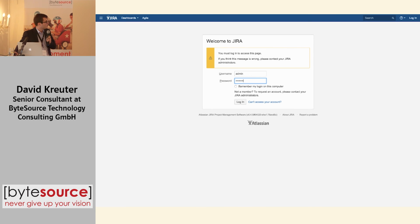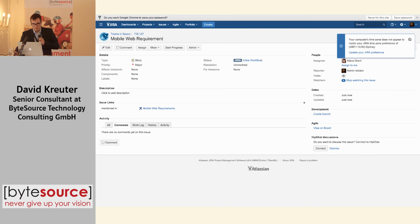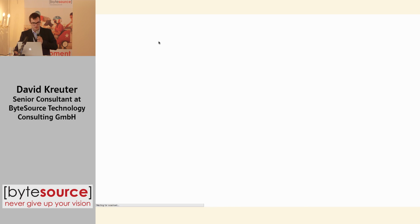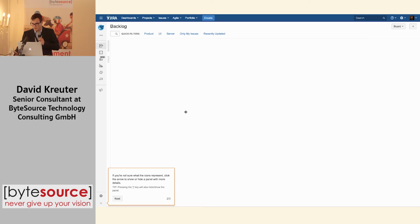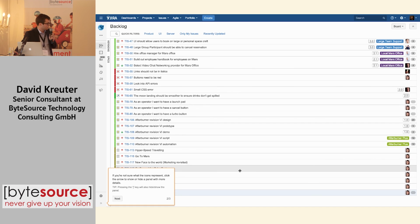But what we want now is that some developer picks this issue and starts the implementation phase. How are we going to do this? As I told you before, we can use the new sidebar. So here we can directly go to the backlog view. For those people who don't know what the backlog is, it's a collection of stories and requirements that should be implemented. And now we say it should be implemented in the current sprint, in the current iteration phase. So we scroll down, and somewhere we should find our mobile requirement story here. And we move it to the current sprint.